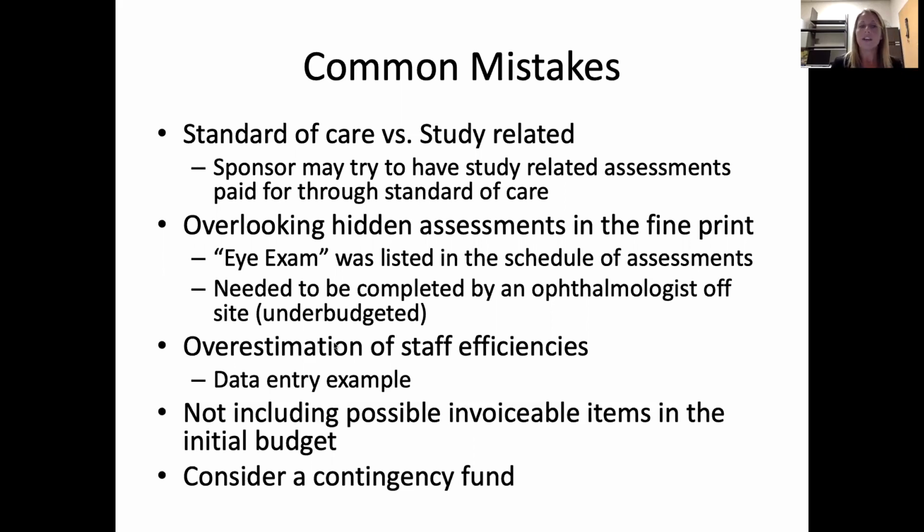It's just more challenging. So I know we always ask for eCRFs from the sponsor before we get a trial up and running. It helps us build our source documents, and then you can start to see what the data entry looks like before you finalize your budget. So these are things that sometimes we don't think of, but if it takes you twice as long to do your data entry, that's not free, right? Your staff have to do that. So something to think about.